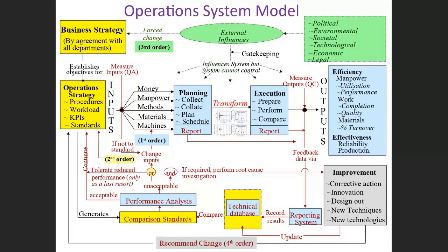Once you've gotten your output, you need to implement quality control — checking whether the quality measures predicted at the start were actually achieved. Using a welding exercise as an example: a quality assurance activity would be selecting the right electrode for a particular base metal. A quality control activity, on the other hand, would be checking the porosity of the weld, or checking its strength and penetration between the base metals — using methods like dye penetrant testing or radiography.